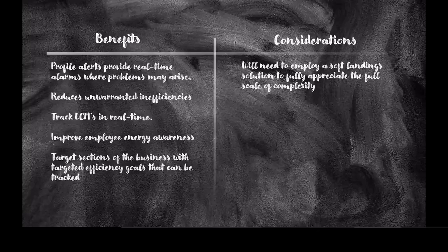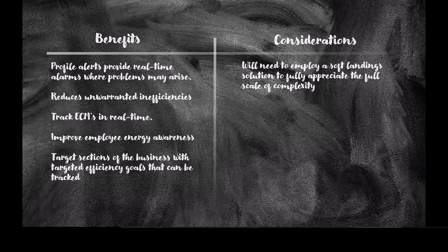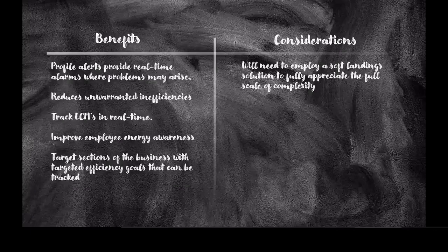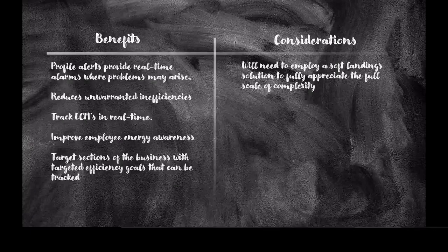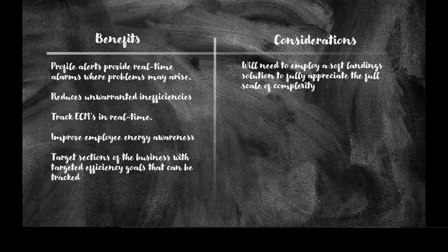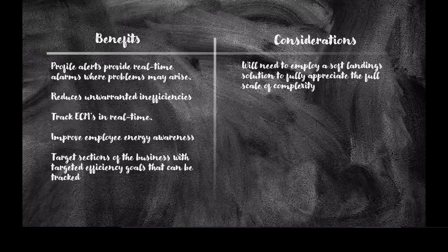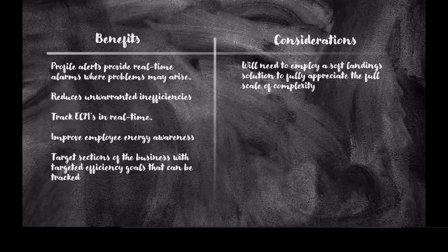A client will go to a consultant with a problem, the consultant will take that information from the client and then create a specification that will go out to many different people, and what originally started as quite a good idea, by the time it's delivered, often changes. There's been lots of research and studies that show the disconnect between the point at which you deliver a project to the point of handover, and then the delivered results don't ever quite seem to be what we first intended, or not we, but collectively as a sector.